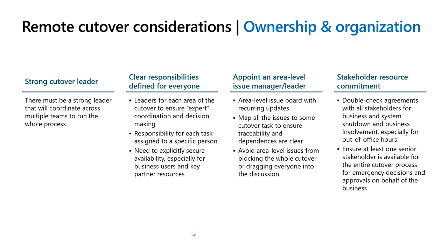Nobody does anything until they get a signal. Step 17, yes, go. Step 18, hold. Step 19, where are you at, right? They coordinate the whole thing. Now, they've got a dashboard and they're making it visible to everybody, but they are coordinating the whole thing through one person. Obviously, you probably have a substitute as well, because no one person is going to work through a 48 hour cutover.